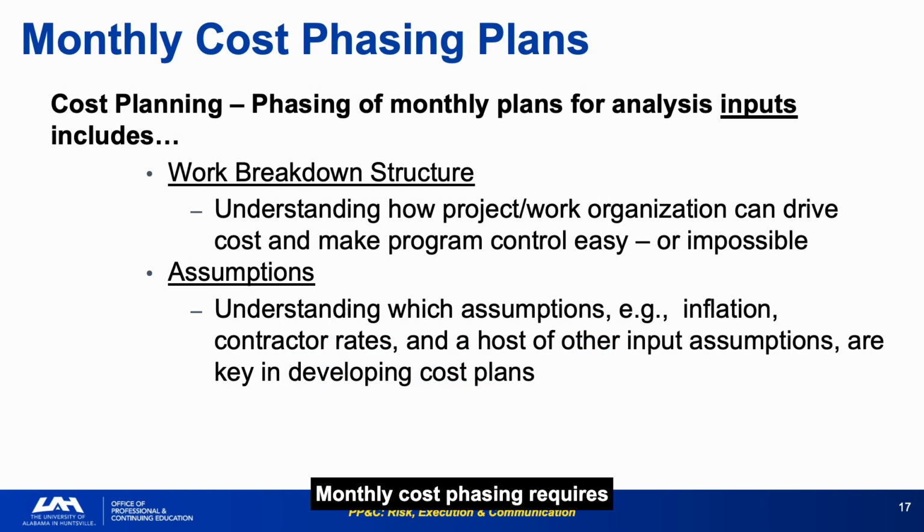Monthly cost phasing requires understanding the WBS structure that organizes the work and the assumptions, including inflation rates, contractor rates, and workforce projections that convert technical scope into dollar estimates. The assumptions underlying a phasing plan are where the intellectual work is. A phasing plan without documented assumptions cannot be defended under questioning and cannot be updated as conditions change.